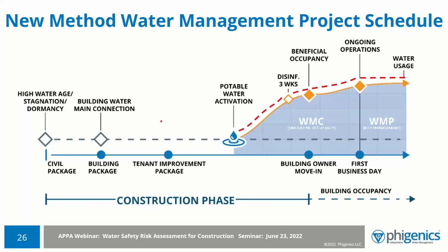I'm not a plumbing professional or engineer, but you can have that discussion, and we have had some very creative thinking with the contractors of how we could have a described day, a specific day for water activation of the potable system, and then manage and start the water management program from this date. Not wait until the accident happens.